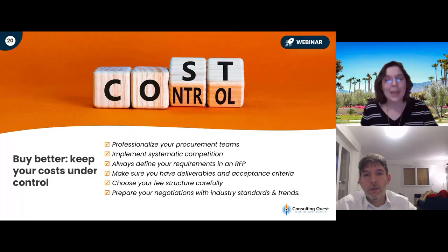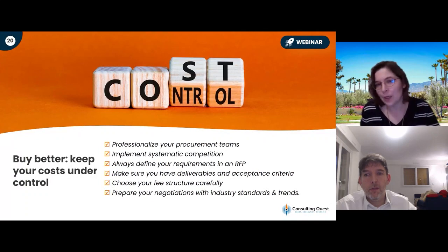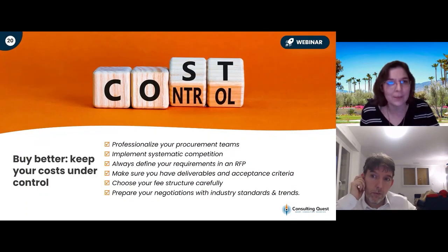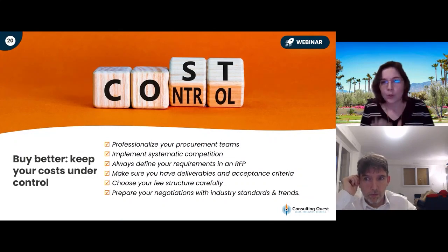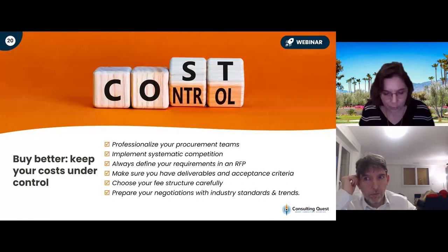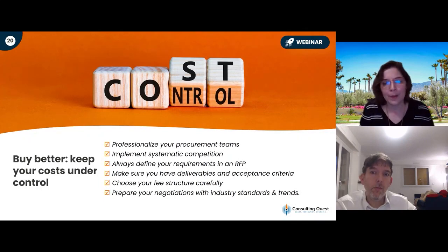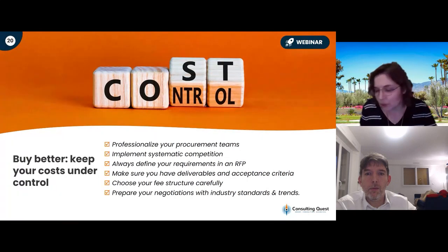So that's very important. Even if you don't launch a competition, still define your requirements, because that's how you make sure that your expectations are clear to the consultants, and they know exactly what you expect from them. And that means having deliverables, and that also means having acceptance criteria. And then you also have how to prepare your negotiations in the right way to understand what you can and cannot do. And the last thing we wrote was about choosing your fee structure carefully.